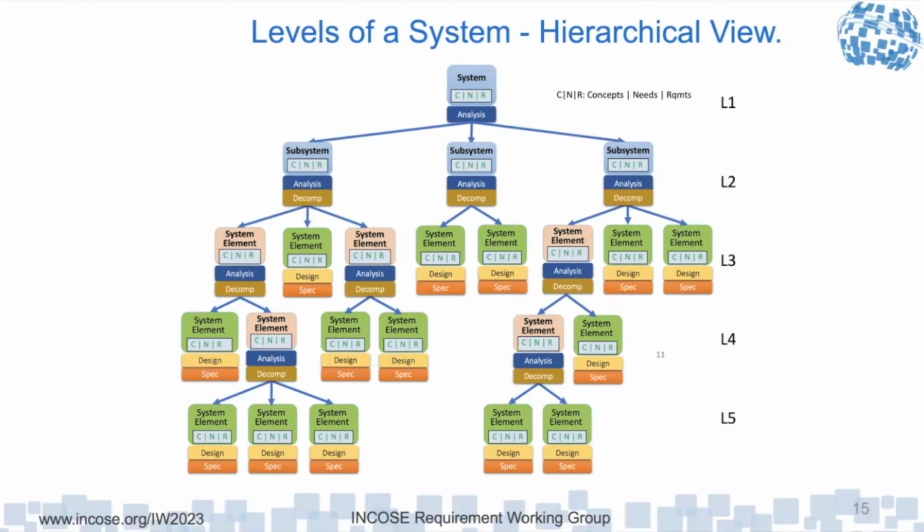So there are a lot more things that have to happen at that higher level than just a set of requirements for the coffee machine. All the other work that needs to be done has to be stated somewhere, either as a statement of work or as an end product. That's why the 632 view of a system comprising operational products, end products, and then enabling products is a really good view to start with, because of the shed load of things that turn up on the project work breakdown structure that aren't in the end product. If you don't have that view right off the outset, you've missed so much work, it's not funny. In fact, it's the single cause for me of projects overrunning, because they haven't quantified the work appropriately at the outset. So the scope is inappropriately quantified, which means the budget and the schedule aren't adequate either.